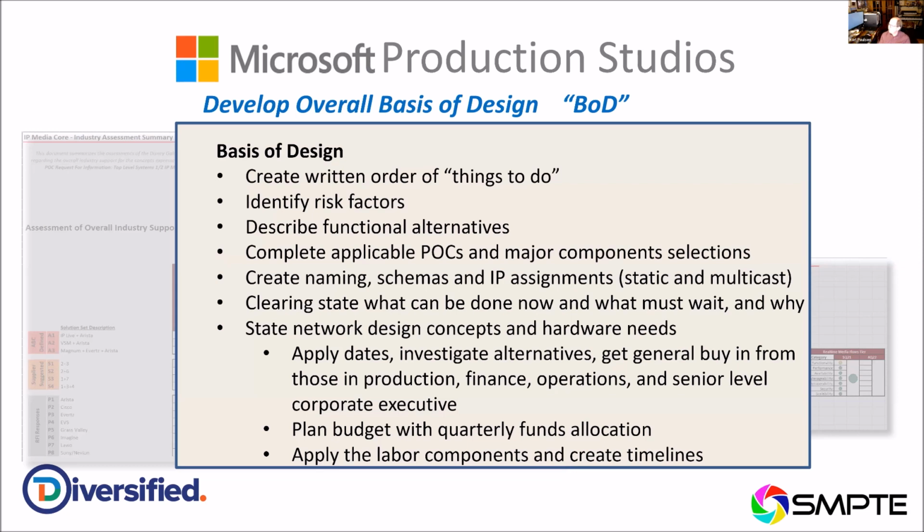So the vendors had to really come clean to us as to when they could deliver a product, because the ability to pay for that from the Microsoft corporate funding processes was essential to us placing an order. And then on top of that, we'd apply the labor components and create the timelines for the implementations.